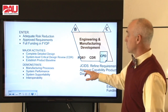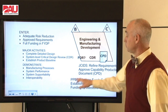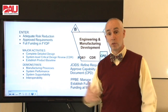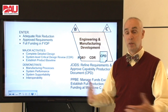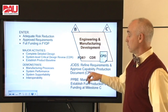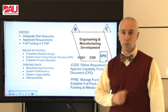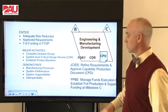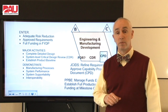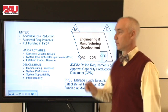We also have to prove interoperability, supportability, and all those areas of system performance. JCIDS will be refining the requirements — we need dialogue with our users to capture lessons learned through the development and design. They will update the Capability Development Document into a Capability Production Document, which has to be signed and approved prior to Milestone C. We've got to continue to manage our funds and make sure we have full funding for the production and support of the system going forward into the next phase.